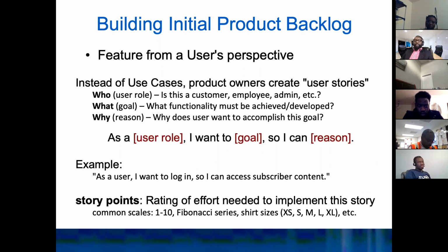Okay, and there are three things that enter into that user story. The definition of the user story is the who: who is the user of that feature the user story is describing. The what: what's the goal, what are we trying to accomplish. And the why: for what reason. Okay, and I gave you an example yesterday as we were talking about studying and prepping for the certification.